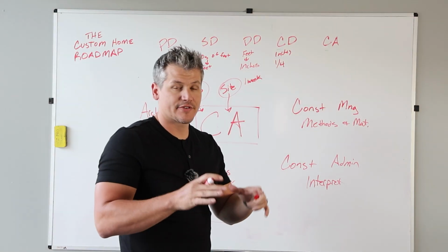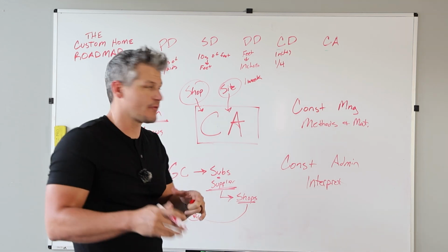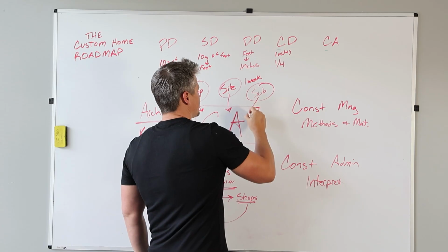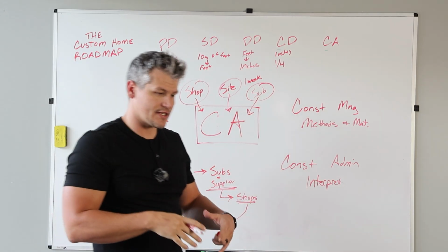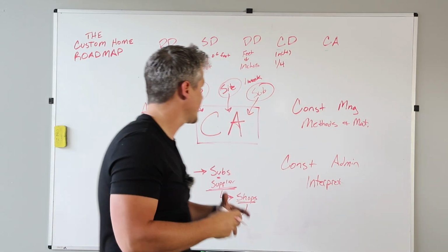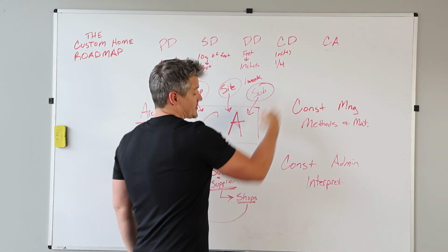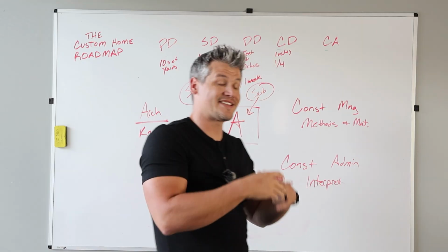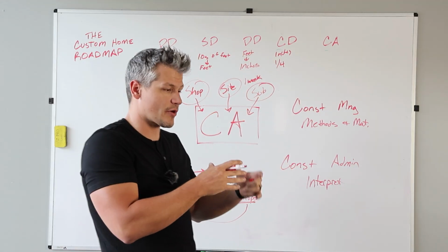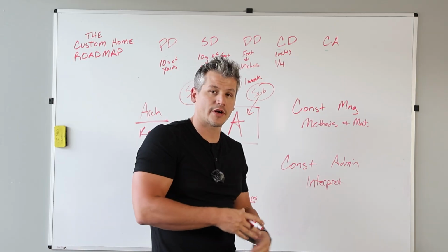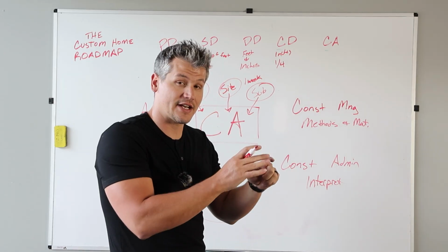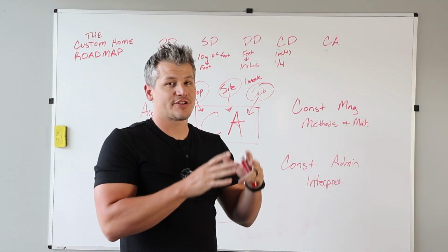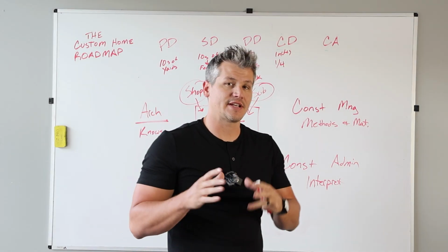Okay, so the third service that's involved in construction administration is what we call submittals. So submittals are simply changes to the products inside the design that the general contractor is requesting. Now this comes in the form of just an RFI, so sometimes they'll submit a request for information, sometimes they'll submit a submittal where they want to replace one product with another, maybe because they're more familiar with a product. But what we do is we just take that information from that submittal and compare it to the overall design.